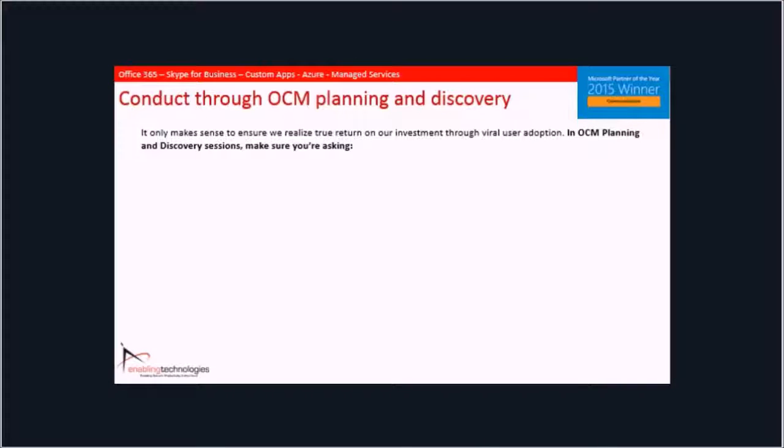First off, before you start this deployment, make sure that you're having a thorough organizational change management planning and discovery session. Many of you on the call have likely gone through technical planning and discovery sessions. In fact, I would contend probably all of us have done that before implementing a new technology. But how many of us have ever done the same thing, but with what I call the softer side of IT, which would be our users? Key questions that we would want to ask during these sessions would be, what specifically are we rolling out to the users? Again, going back to that usage profiles conversation.